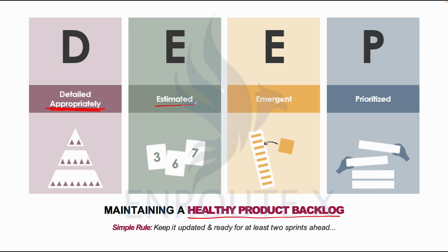So in practicals, again, we'll be making use of Planning Poker as a tool to coordinate the team on how long each work item should take. Right? So that is what the estimate is.